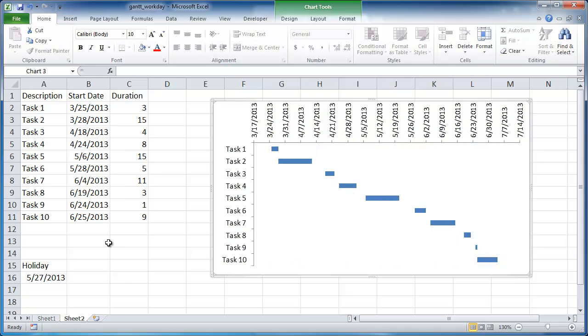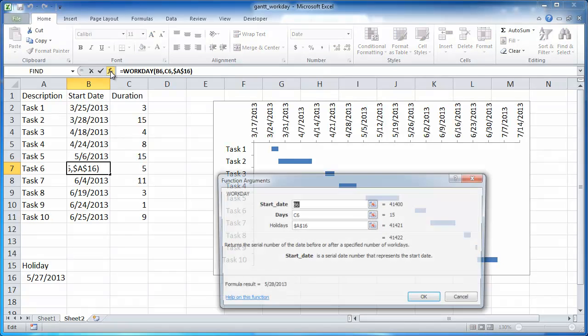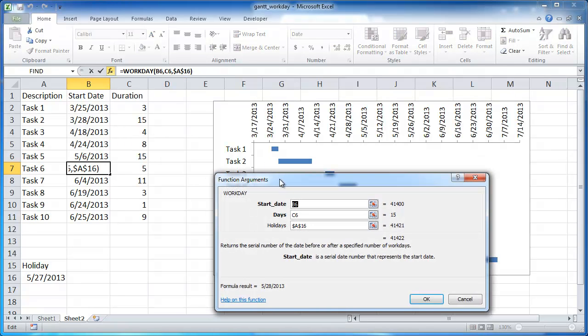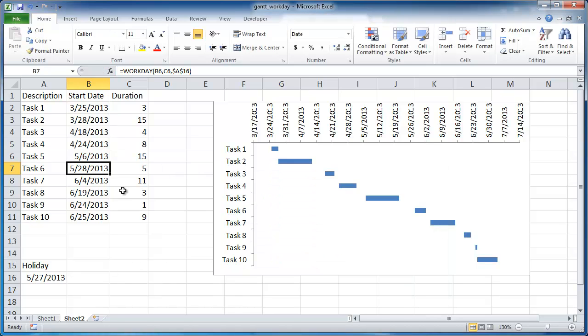Now another thing to think about is how this workday function works. So I mentioned that before, we have our values. Let me bring up the insert function window. We have our start date, we have the days that it's going to add to the start date, and we have holidays. So in this instance we've only selected one holiday here. And it looks for that value in cell A16 which is this one right here. So let's say for example that our tasks span, it could span a time period that includes another holiday. Let's say for example July 4th.